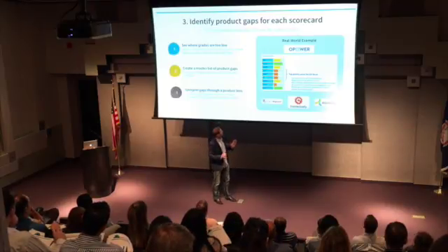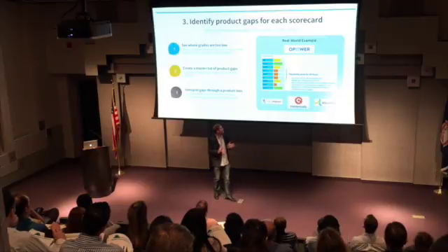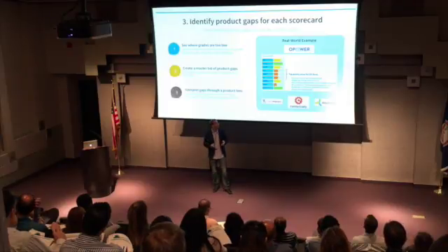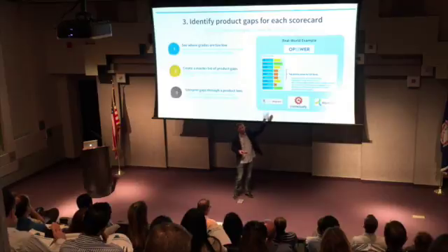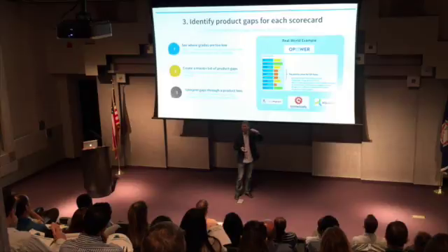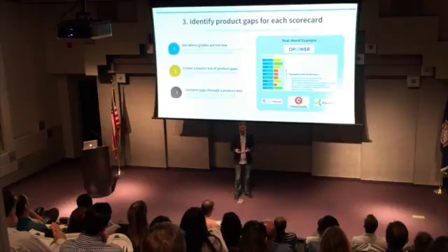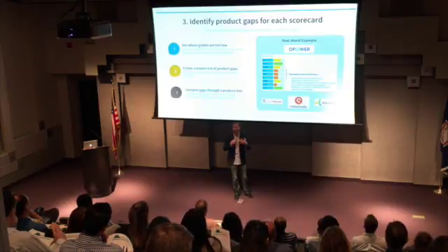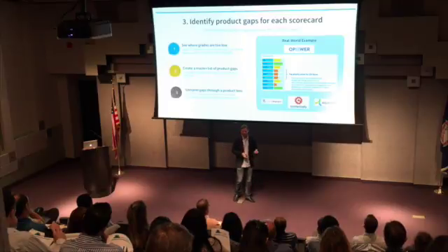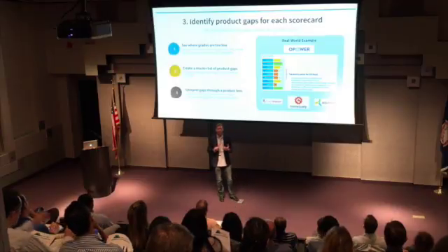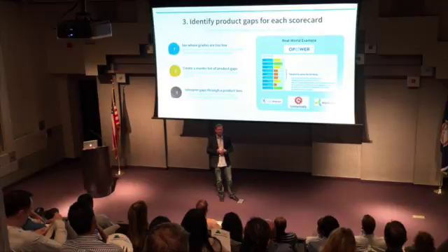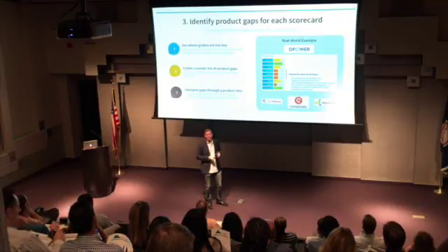But if we're being honest with ourselves, we have some gaps around the actionability, the engaging nature of our product, and empowering our customers to make decisions around their energy use. And the reason that we come to that is because our reports don't tell a cohesive story. And actually, every single one of these, later in this PowerPoint slide presentation, had a page behind it with the backing evidence, right? Which is, here is the actual footage that we have of a 1-minute clip of somebody trying to use our product. This is where we're getting this data from, right? And it was a very compelling, strong case for why we should be prioritizing these problems. And then I, as a product owner, ended up adjusting the roadmap and adjusting the prioritization within the product backlog to reflect what I did here and over here.